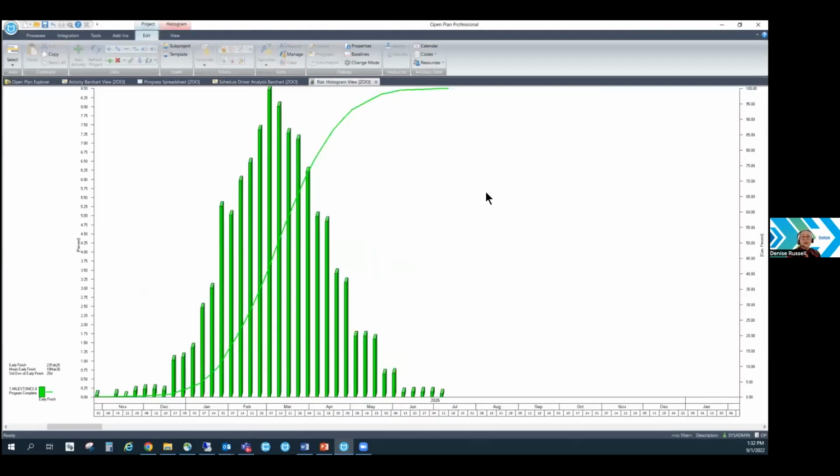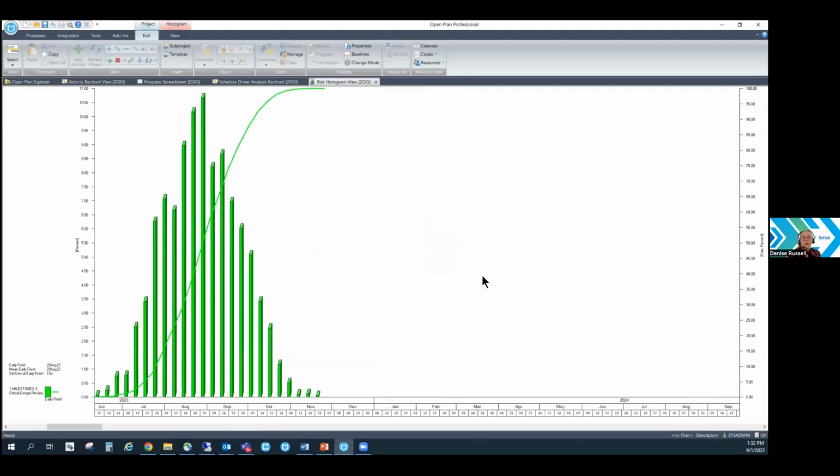When I run that risk analysis, this is currently set on the end of my program completion. If I have interim milestones along the way, I can also flag those and look at those. I would call it a basic Monte Carlo. It is duration only. It is not a replacement for those of you who are using Acumen Risk.